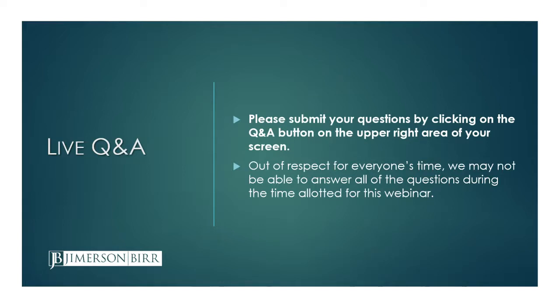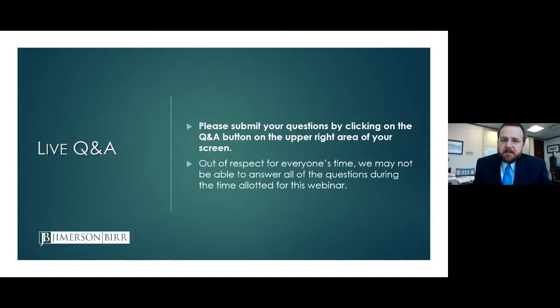I'll take that one, Nikos. Well, so this must apply to a private project because on a public or certainly a federal project, there should be a bond. But my first advice would be check the public records, find the recorded notice of commencement, and if there is a bond, it should be referenced and attached to the notice of commencement. However, sometimes it doesn't happen. It's very rare, but it could happen that the bond's not attached, but there may be a bond.